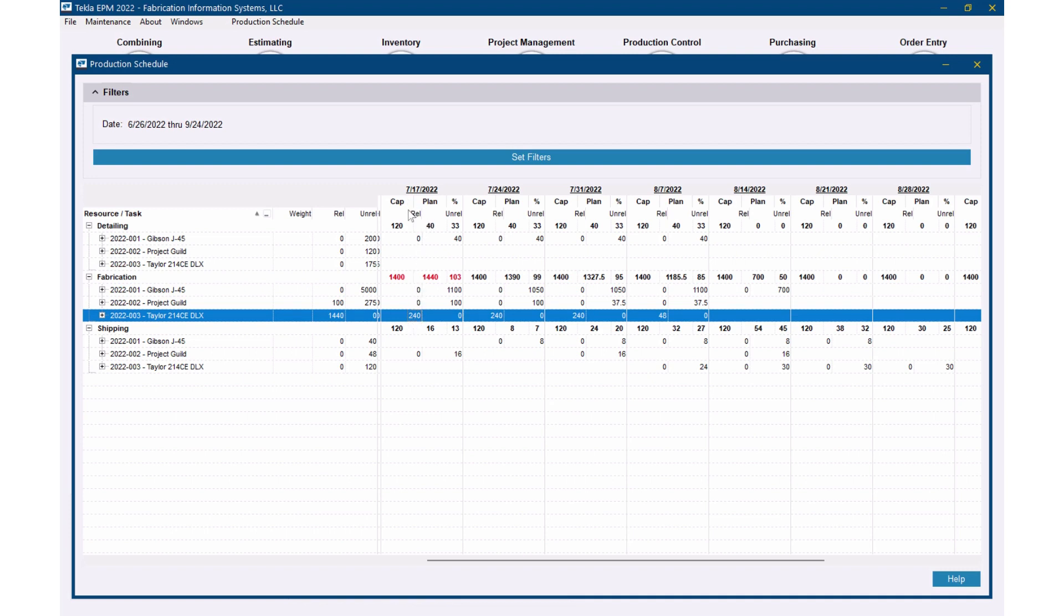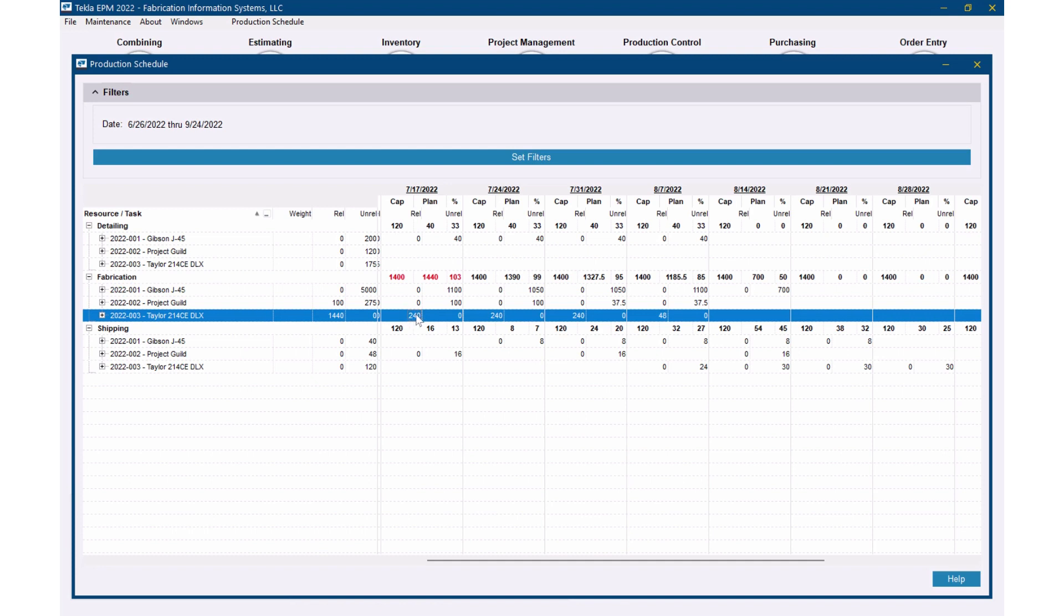So this can be a little bit confusing here. This capacity has to do with 120 hours of capacity detailing, 1,400 fabrication, 120 shipping. Planned is 40 hours planned here, 1440 here, 16 here. So this released is, I've got 240 hours released, which makes a big difference when you start looking at your production schedule. I may have 1440 hours planned, but it doesn't mean anything if it's not released yet. So it's good that it shows me whether it's released or not. And that's just coming from linking up to production control and it figured out what all is released and what is not.